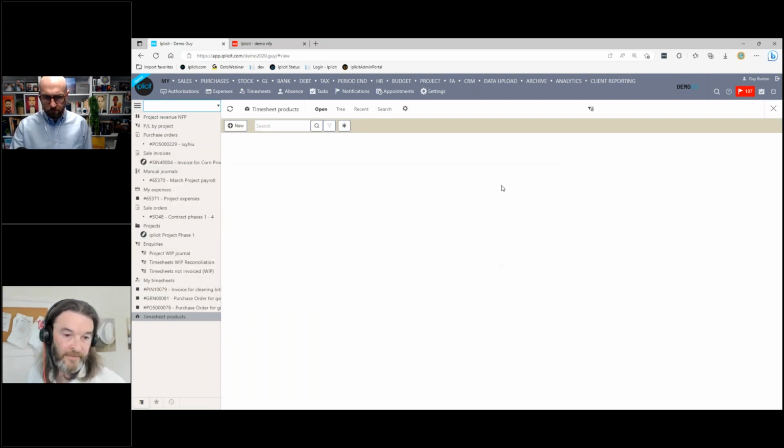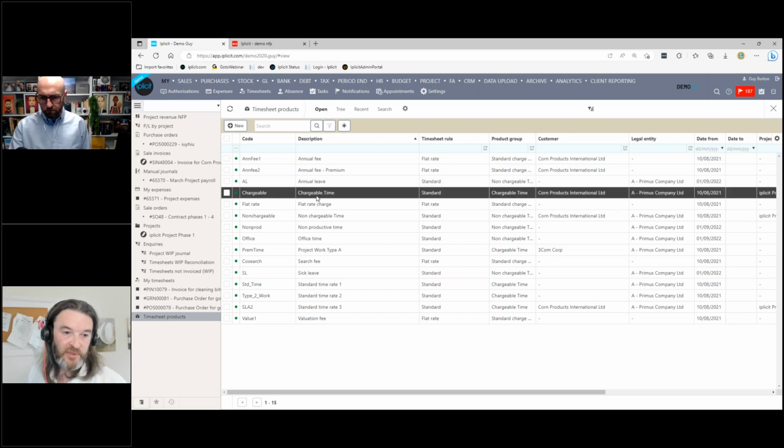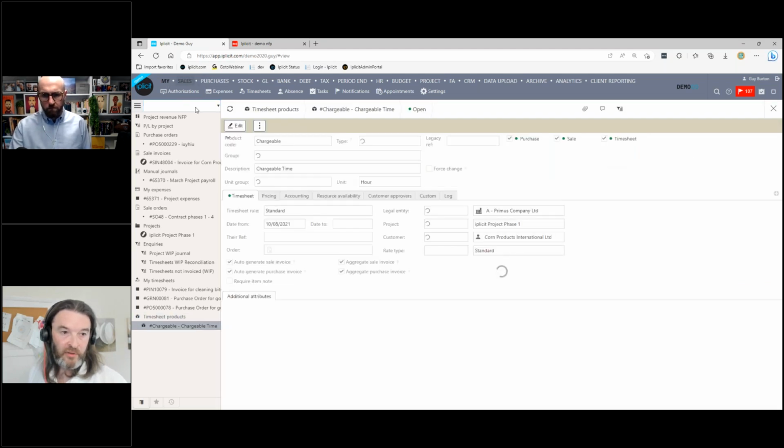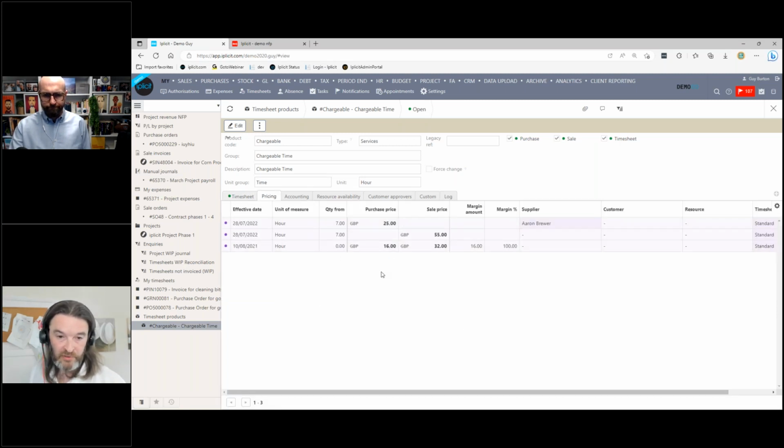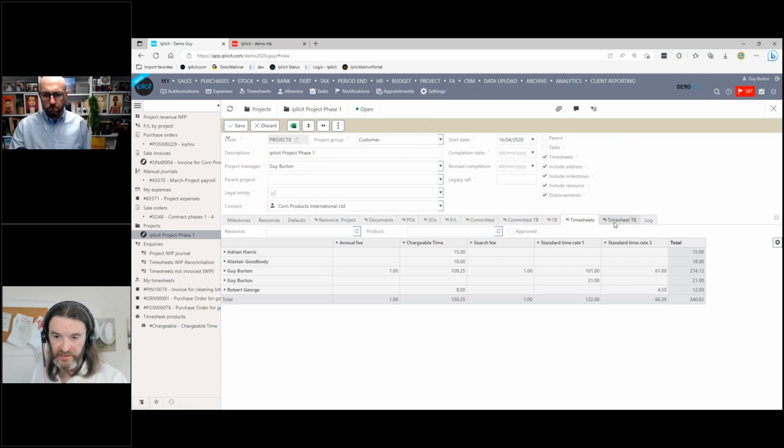So that as people are entering timesheets, and again, in-app or on the mobile devices, we can have different timesheet areas, we can have different pricing models against that, and that includes cost pricing. So even if I'm not physically posting wages and salaries individually to those projects, if I'm capturing time, I can use that as an average cost price, and then I can see against a project how much time we've spent on that, even if we're not charging that time out.